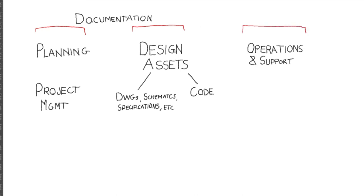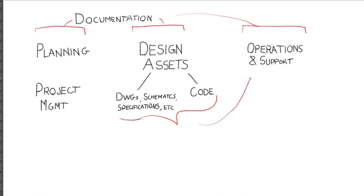For example, the product breakdown structure for a system will be the same for planning, design, and operations documents. This sharing and inheritance of information between phases is essential to advancing system technical readiness.